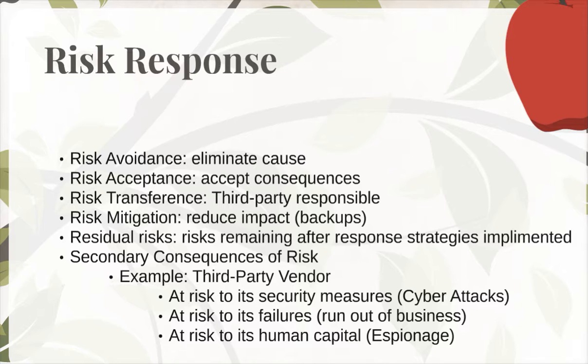Risk mitigation is about ideas like using these third-party backups, reducing the impacts if something does happen. Not only having a backup with the third party, but having a backup plan for yourself in the office. Maybe you have a drive you take home all your work on every day and just copy it before you leave. The residual risks are those remaining after your strategy's been implemented.